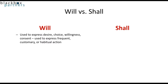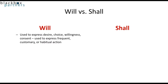Will is used to express desire, choice, willingness, consent, and is used to express frequent, customary, or habitual action. Shall is used to express a command or exhortation — what is mandatory, what is inevitable. There's a big difference between these: will is loose; shall is structured and strict.